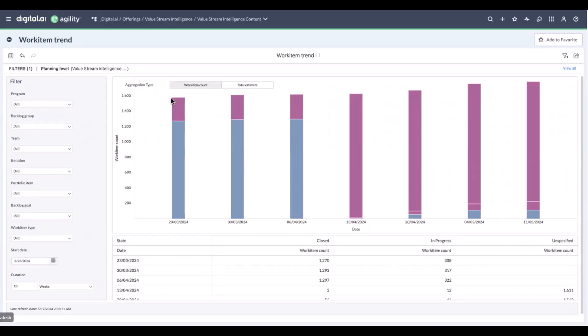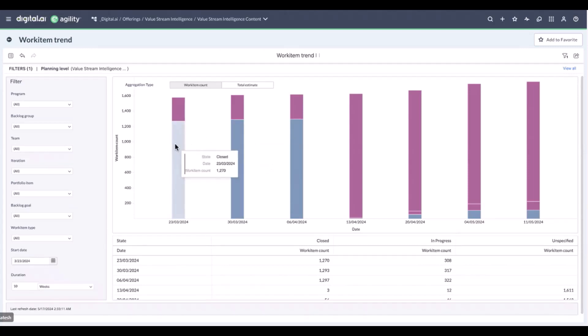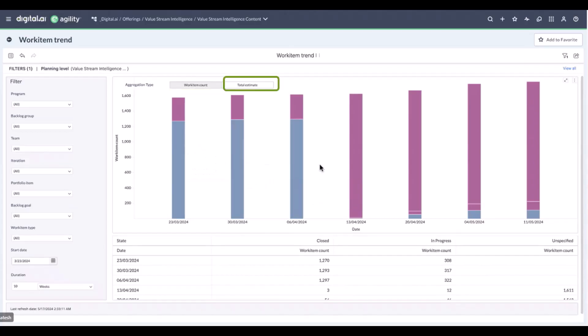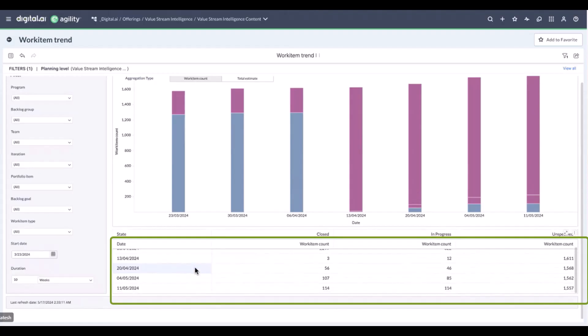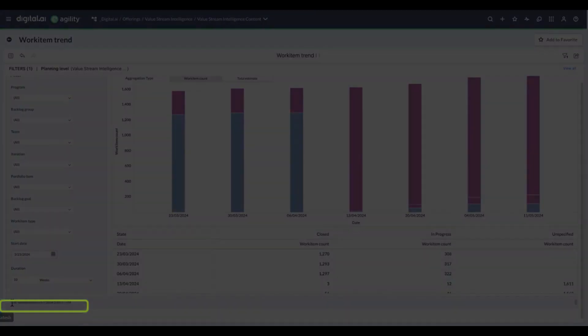By studying this type of data, you can understand whether or not there is deviation from expected patterns of completion. It also helps to understand other sorts of issues. For example, you can see here the number of closed items across these three weeks are much higher compared to the others, so this is something that you'd want to analyze more deeply. The dashboard also offers two different formats: work item count as well as total estimate. And again at the bottom there is a detailed chart which helps you understand how many of these work items are available in progress. We've included the last refresh date to help you get a good sense of how fresh the data is.